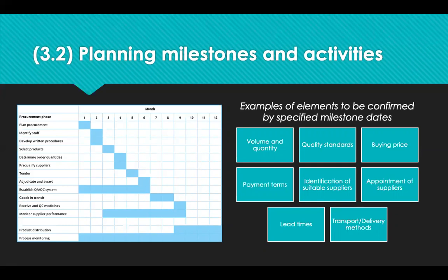And each of those blue squares on the left-hand side are milestones, which are discrete tasks that need to be completed. So to achieve milestones, procurements need to understand and establish the order quantities, the quality standards, timing and delivery arrangements, communicate this with their suppliers, and identify key contacts for buying and supplying organisations who will monitor and expedite progress.